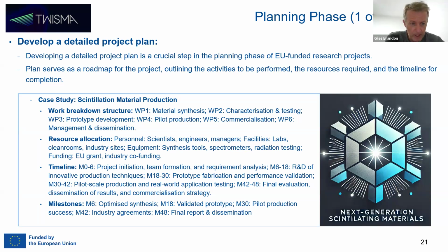And with this detailed project plan, we'll also need to specify the milestones. Milestones are key points in the project which need to be completed in order to progress through the project. With all EU-funded projects, it's important to have milestones spread across the whole of your project, not all stacked up at the end, but also early on.